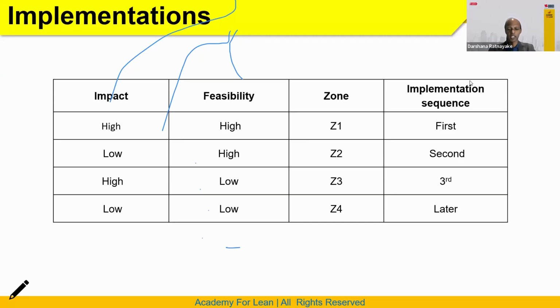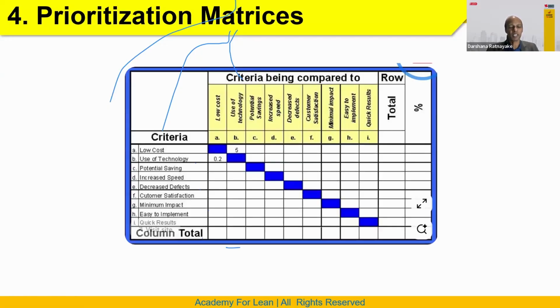Right, we'll move to the next tool, the same tool, right? There is another prioritization matrix. In this matrix, you can see the same thing on this side and the same thing on this side, and you are giving marks. So for the impact of this section on this section, you will get marks, and then you take the sum, and the highest marks projects you take to execute.